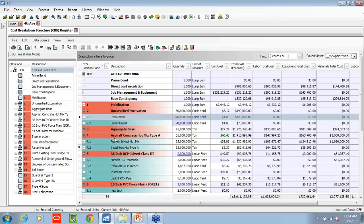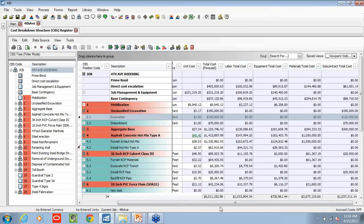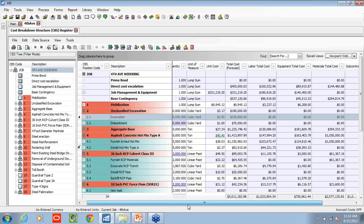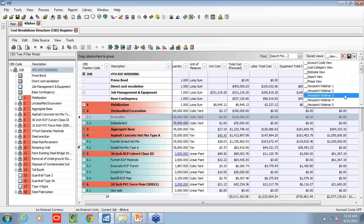But taking any of these line items, we can now see what the breakdown between labor, equipment, materials, and subcontractor is per each of these cost items.